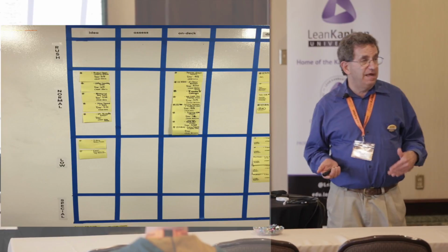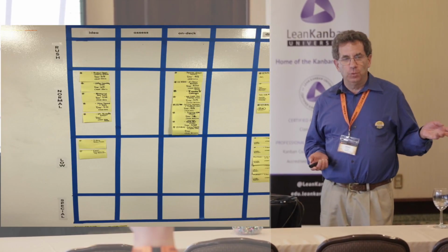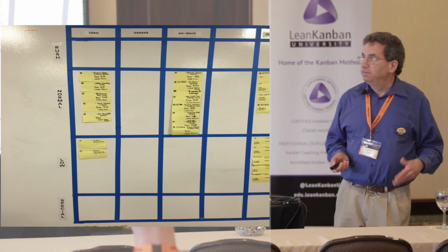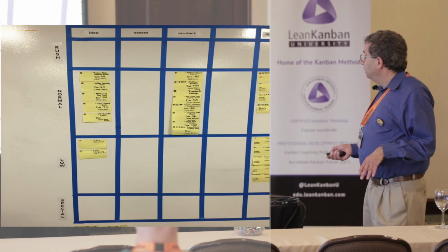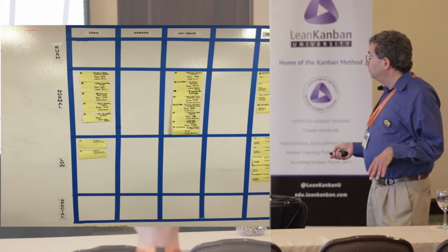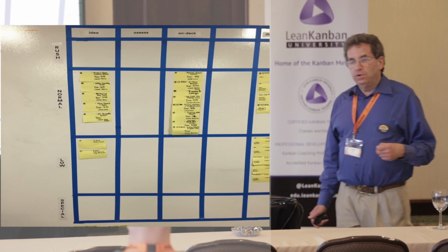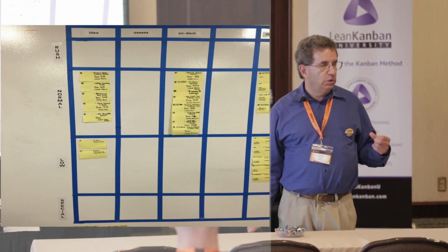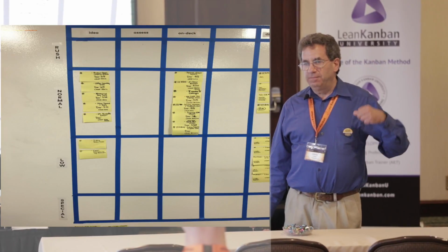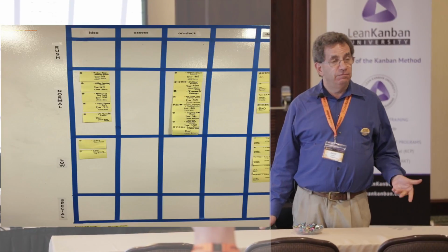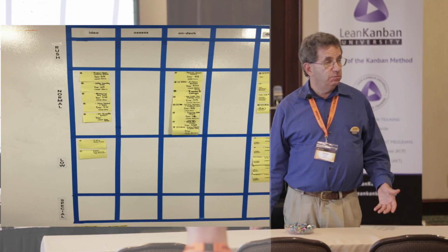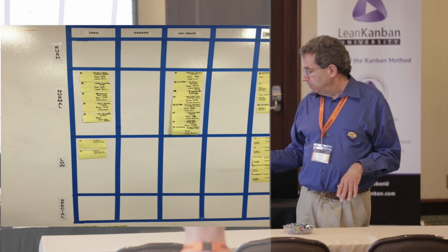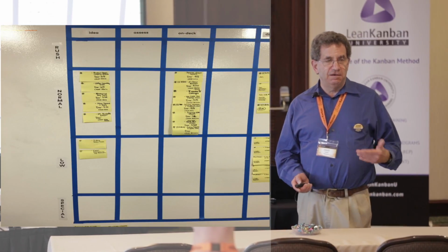As we got the lead time down, the rushes became rarer and rarer, and we could start enforcing real WIP limits around the rush column. The low and the special columns were particularly useful because that's where we could keep people fully occupied doing work, but when a rush ticket or an expedite came through, we actually had some slack in the system. We could take them off the low priority stuff, put them on the high priority stuff and on the expedited stuff, and not damage the business.